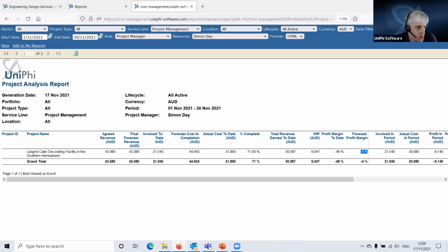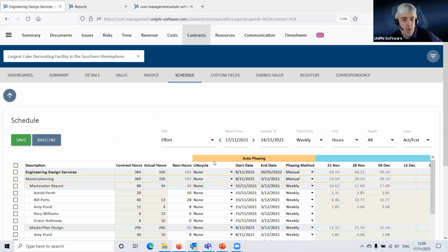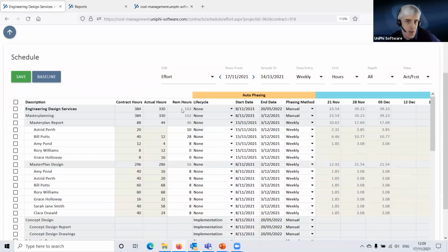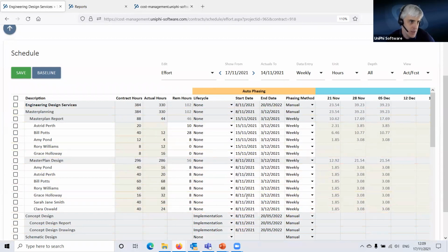Now, I've done the usual project manager thing here, I've just stripped out the hours. I've said, you're not doing those hours. That's not happening. And that's fine. But the fact is I know they are happening, and we'll get to that. But for the original scope effort, those hours are not happening. I've gone back and spoken to them about the effort involved for the original scope. It looks like it was over what we said originally. We under quoted the number of hours, and we have to wear that, but it wasn't as far over as everyone was saying initially. So maybe it's going to be okay.